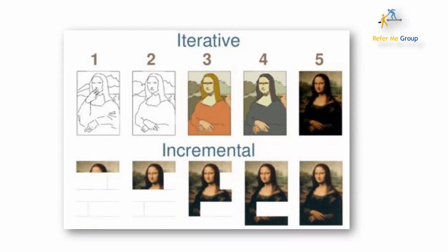Now, if I talk about iterative, I am delivering the first time with UPI payment. UPI payment I am delivering in one sprint or in one release. It's a complete functionality we are delivering. But the payment gateway, we are not delivering completely. We have delivered one part of the payment gateway, right? But whatever we have delivered, like UPI payment, that is complete. There is no defect, and that feature can be used by the customer. Same thing we say always, iterative and incremental. Whatever functionality you are delivering can be consumed, although it is not a complete feature.